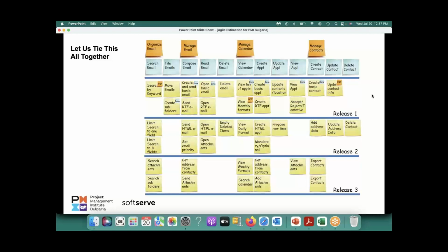Or many times what happens, if your company is executing 15, 20, 30, 50 projects, the priorities change. So let's say the team spends 4 months on this, and the priority changes, the team has to move and do something else. If it was waterfall, all this investment goes out of the door because nothing is in production, right? But in this case, in 4 months, you would have put 20, 30, 35, 40 stories in production. People are using it. So all that investment that was put is still used, and you have flexibility to terminate the project sooner.